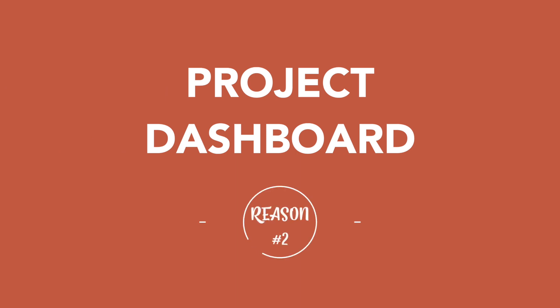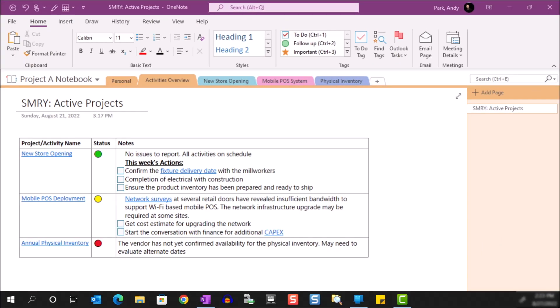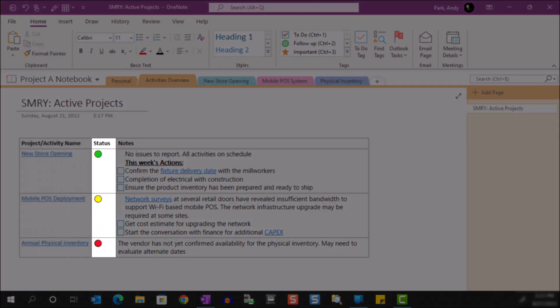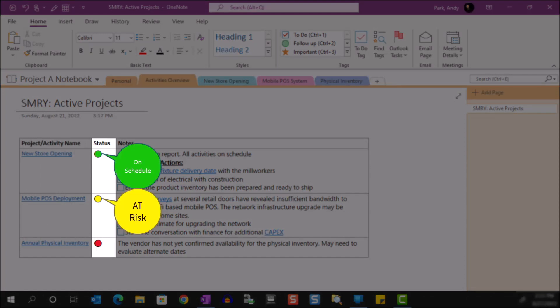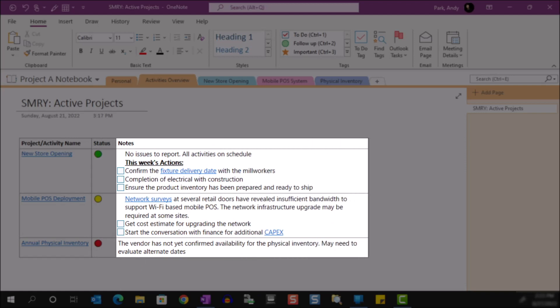The second reason that prompted me to experiment with these summary pages is to have a dashboard view of all my active projects and activities. By having a landing page that shows what I'm actively working on, it helps me stay on top of everything, and this summary page is also useful to update my manager during our weekly status. As you can see, I have all my projects and activities listed in the first column, their status in the second column, using a traffic light to show whether a project is on schedule, at risk, or behind schedule. And in the third column I show some of the next actions, key decisions made, and other relevant comments that help explain the status.